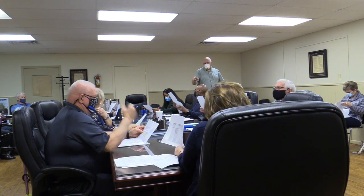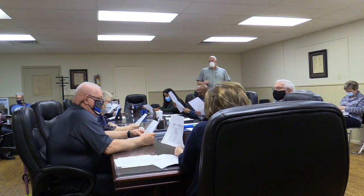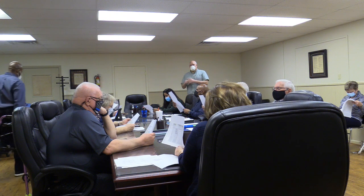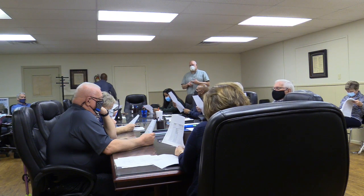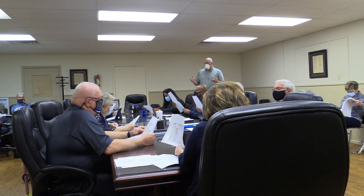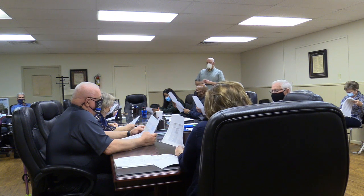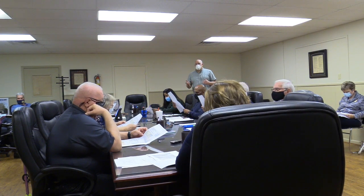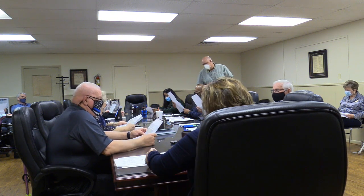So we've actually saved money overall, which is pretty unusual. And we are doing our best to try to track that. On the left-hand side in the beige coded area here, you're seeing tracking allowances. We have a handful of allowances in the project, unknown at the time of bid, but things that we know we want to reserve some money for. Tracking furniture, tracking just anything and everything we can think of, including things we can't think of, such as contingency. So you'll see, I think it's line number 44 in red, the construction contingency is down to $200,000, which is pretty good considering where we're at in the overall scheme of things. We're out of the ground, there aren't any more really big surprises left. So we're tracking really well.